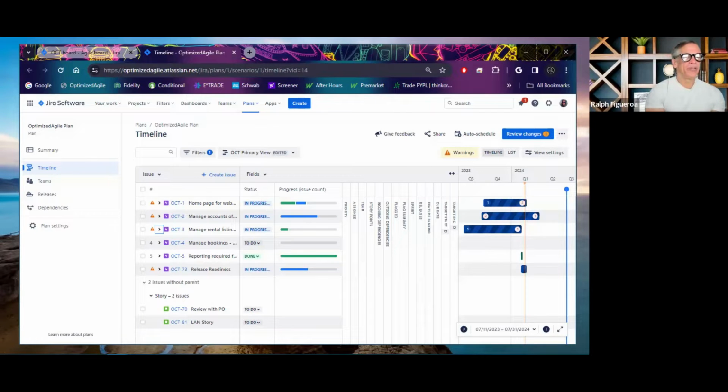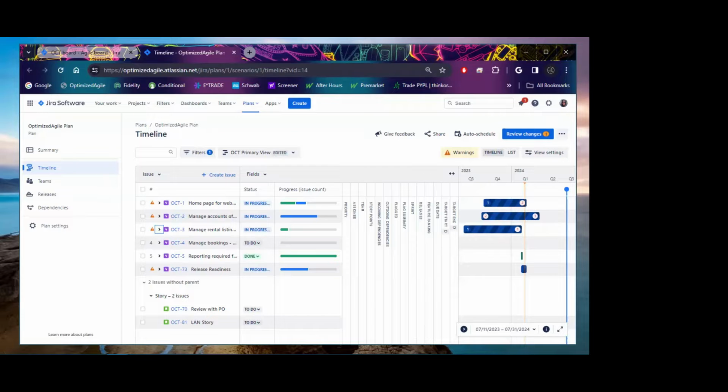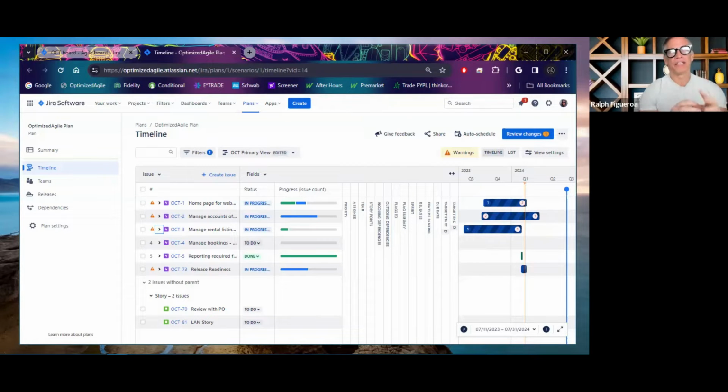So the theme here is that for this to work very effectively, and this is true for most of the tools out there, the team has to have and develop the discipline of ideally creating discrete epics that are meant for specific releases, and tag those epics and the stories, the artifacts that are associated with those epics for that release with a consistent fixed version, right? That's key. That way you can apply the filters and you get all the content that is really related to that fixed version altogether.